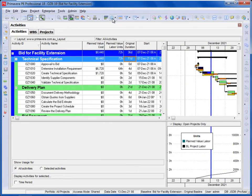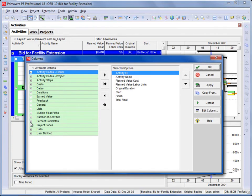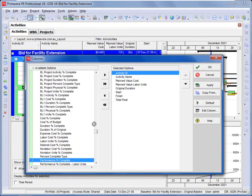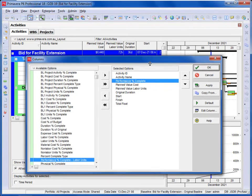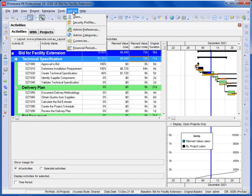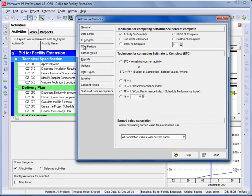P6 has a column called Performance Percent Complete, and the Performance Percent Complete is used to calculate the Earned Value. The way it calculates Earned Value is set in two places. First, we go to Admin Preferences and go to the Earned Value tab — this is the technique for computing Performance Percent Complete.